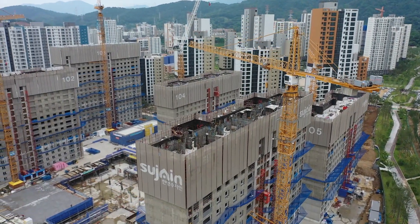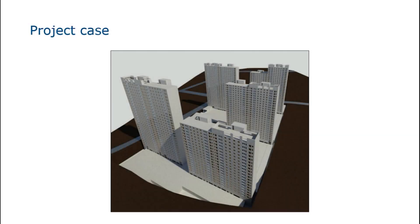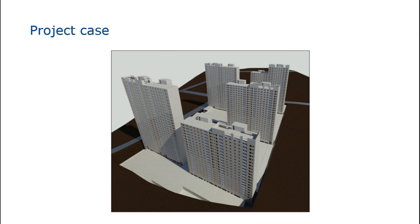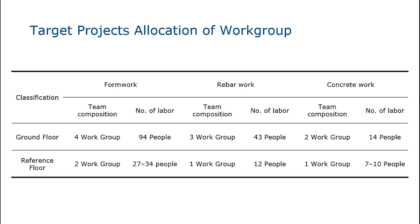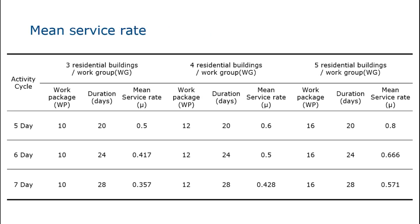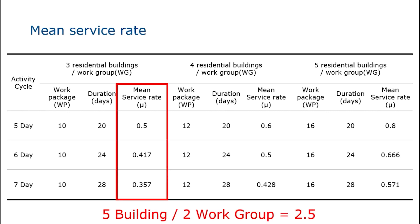We applied the 4D digital twin framework to a real project. All construction project information was digitalized for the BIM model, including formwork, rebar works, and concrete works quantity per unit of work package. The elements to be input into the queuing models were extracted from the digitalized information. The target project has five units and a total of 130 work packages. The resource input plan of the site is expressed in a table showing the number of manpower to be assigned to each work group. However, the actual productivity of the input manpower differs, and the problem of how much manpower must be input to complete one work package contains many uncertainties. A table shows the number of residential buildings assigned to one work group and the mean service rate according to the activity cycle.